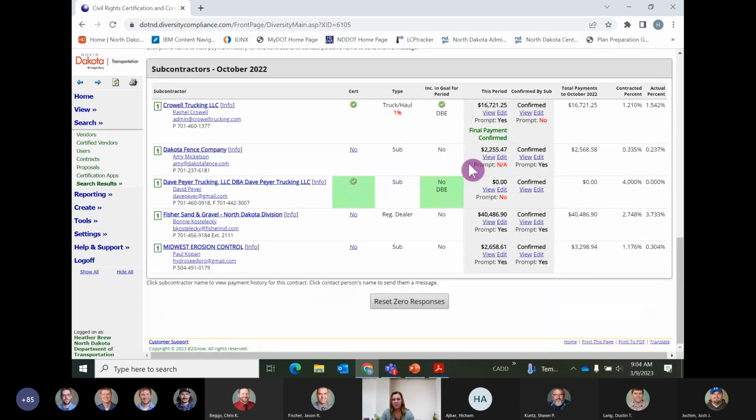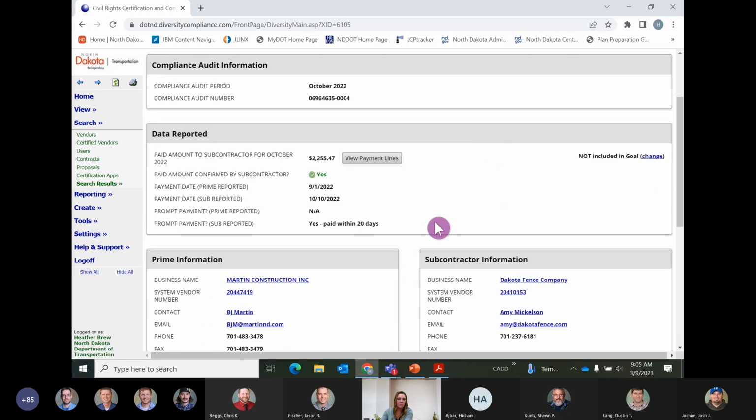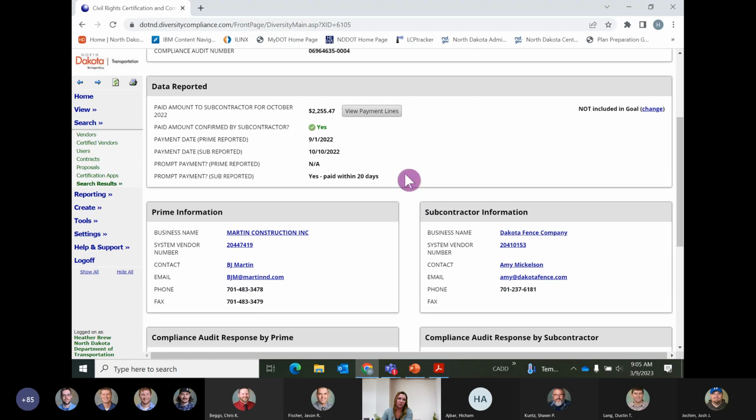I did ask, you could see here, there's an NA. I did ask Amy Conklin about this NA part, and some of the stuff that gets automatically pushed. She said this can be errors resulting in a few different ways, but if you get this on your project, I would recommend checking it like the 1st and the 15th of every month, because you know when your estimates were run, but you have to wait until accounting processes all their stuff. If you have NA, you can click view and sometimes it'll give you an answer, but this could just be an error in the system too. She said you're more than welcome to reach out to her. She manages the DBE payments and Doug will manage the non-DBE payments. But typically it'll be a yes or a no.